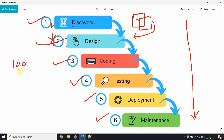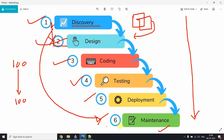You have a hundred features. You code all of them, test everything, push to the repository, go live — and then the product owner looks at the running application and says 'this is not what I was expecting.' If implementing those hundred requirements took three years, that means three years are totally wasted. That is the main reason we are not using the waterfall model.